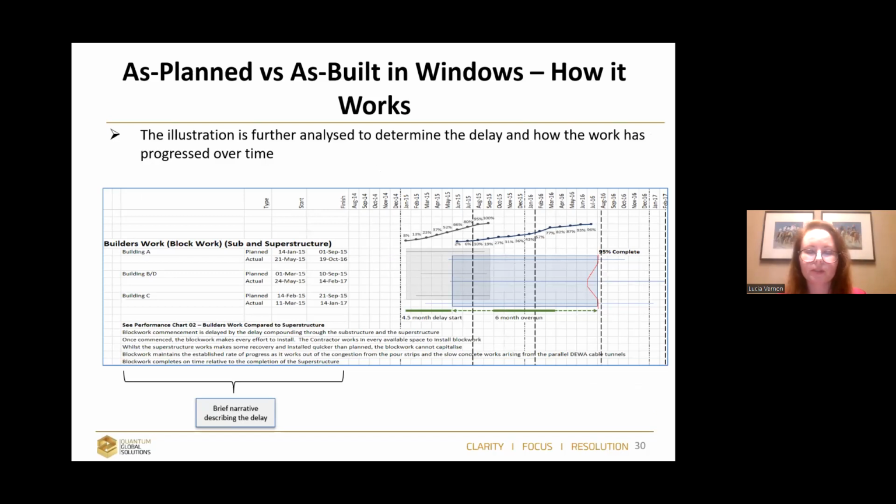But there is another type of delay, which is a disrupted event, which could have impact on a completion date, but does not need to have. But it could be useful to know about that for the disruption claim. So this will show me, okay, we're doing block works. We started late, but we were also doing it very slow. So you can see there is a 6 months overrun. And that's something we can use for the disruption claim when we add resources.